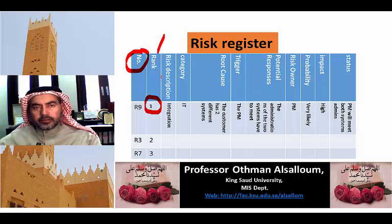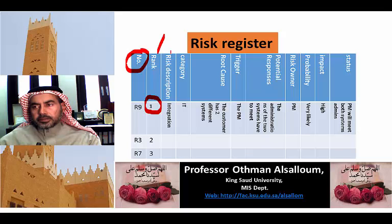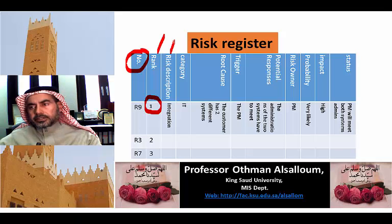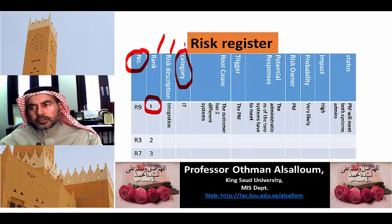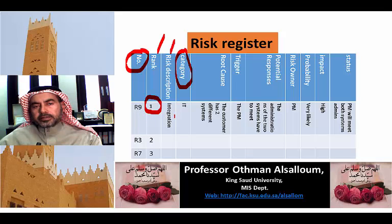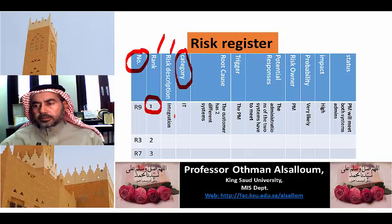The one with the first priority is ranked number 1, and so on. We put a description for every potential risk and make a category — which department or which subject it belongs to. For example, Risk item number 9 is about integration with some systems. We rank this as a first priority potential risk, and it belongs to IT.